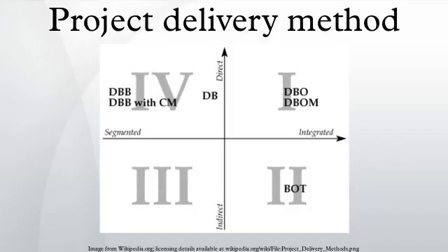The owner's direct financing of a project simply means that the owner directly pays the providers for their services. In the case of a facility with a consistent revenue stream, indirect financing becomes possible. Rather than be paid by the owner, the providers are paid with the revenue collected from the facility's operation.